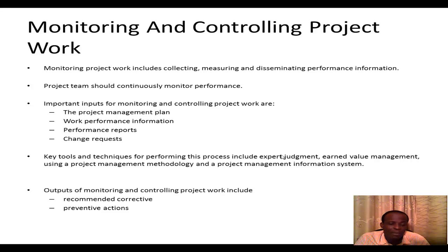The same applies to performance reports, and sometimes there could be change requests where, due to a very good understanding of the project, you need to make one or two changes. But of course, the changes should go through the formal change processes in the organization. And then once the change is accepted and implemented, the necessary adjustments are made in the project management plan.